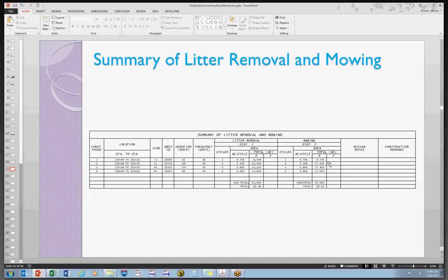Usually those are moved to the edge of the roadway by maintenance or others. Not during construction. We have to pick up litter on the roadway during construction. But we don't mow asphalt. They will deal with that during construction as needed, but the quantities for the litter removal should be from the edge of the travelway, not in the middle of the roadways.